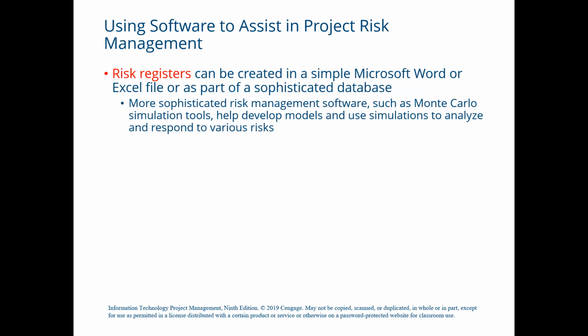So girls, what software should we use to assist in project risk management? In our previous lecture, we talked about risk registers. Risk registers can be created in a simple Microsoft Word or Excel file, and I showed you one example in Excel, or as part of a sophisticated database. More sophisticated risk management software, such as Monte Carlo simulation tools, helps develop models and use simulations to analyze and respond to various risks.